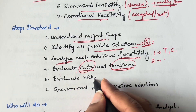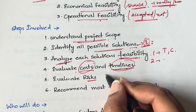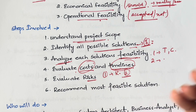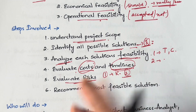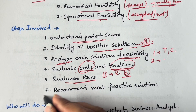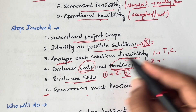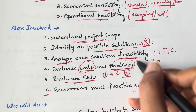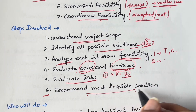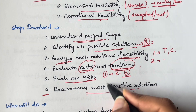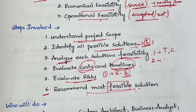Next, evaluate the risks associated with each solution — what could the possible risks be if you go with solution one, solution two, and so on. Finally, based on cost, timeline, and risks, you select the most feasible solution — the most reliable and worthwhile option. That is why the word 'feasible' is used.